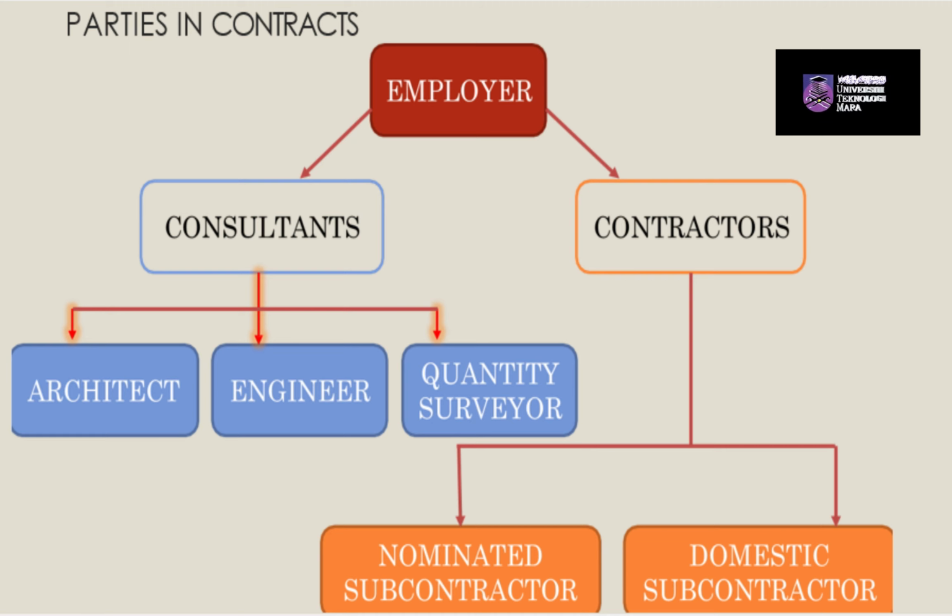These are the parties that are involved in the construction contract. As you can see from this diagram, the main contractor oversees and manages the construction of the building for the employer following the architect's and engineer's design. The work is delivered under a contractual agreement. The main contractor will then select his own subcontractors based on their capability, availability, and price. It is called domestic subcontractors.